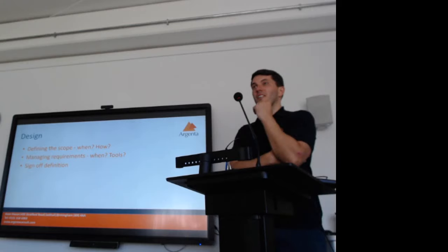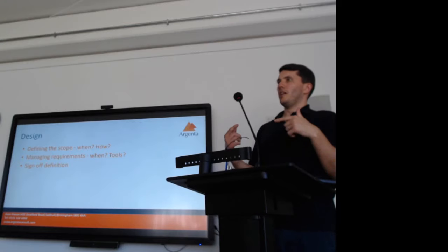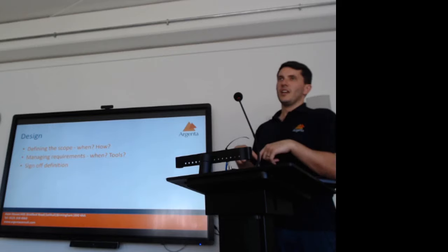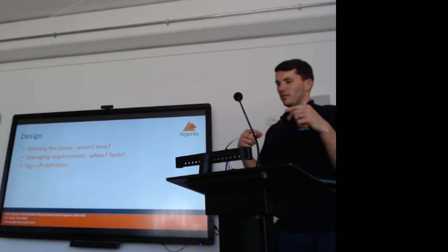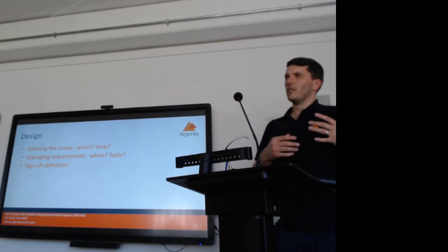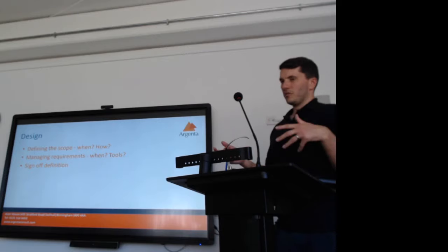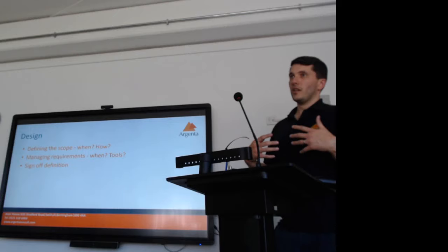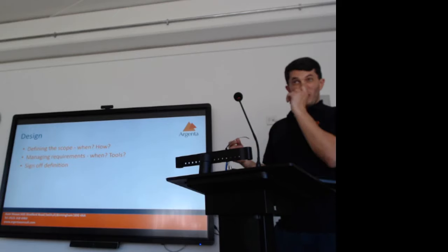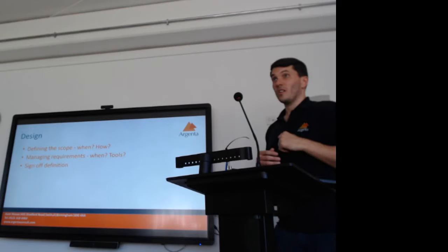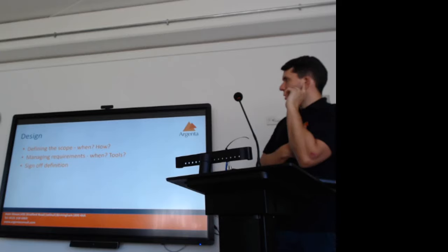What I find with signatures is it really makes people think about it, and they will definitely read that document if they're going to sign it. So we typically do a design acceptance. For the smaller stuff, perhaps not, but for bigger stuff we try to get the design acceptance done, where we sign it to say this is what we're committing to, and they sign it to say that's what they've asked for. That works quite well.